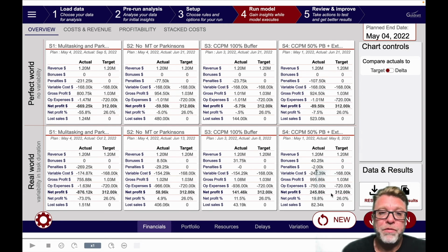It's called a project portfolio digital twin. It essentially allows us to combine the power of optimization engines to find what's the best possible plans with simulation, simulating the execution of those plans, not just to see which one will give you the best planned duration and cost, but in real world conditions with variability and unplanned events. And then on top of that, combining it with a library of best practices. So you as the user can just click on a button and say, what if we try to do it this way rather than that way?